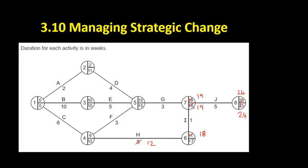But it looks like we've got a new critical path because when we take three from 19 to work out when activity G must start by, that gives us a bit of slack here. We can start activity G on 16 weeks without delaying the project because we've got to wait for activity I to be completed. However, 19 minus 1 is 18.